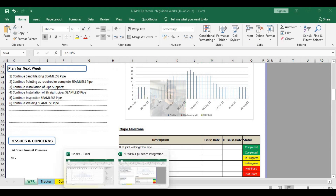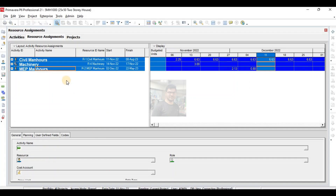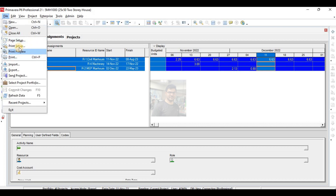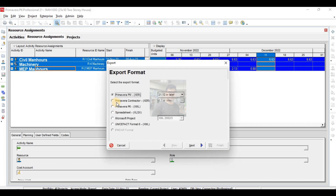So these two things I have explained in today's lecture: coding and filtering of your schedule, and resource histogram — how to make a resource histogram of your schedule. One other thing I will also explain is import and export. Many times you want to work in Excel because working in Excel is easier than working in Primavera, so first you export your schedule to Excel, make changes there, then import it back to Primavera.